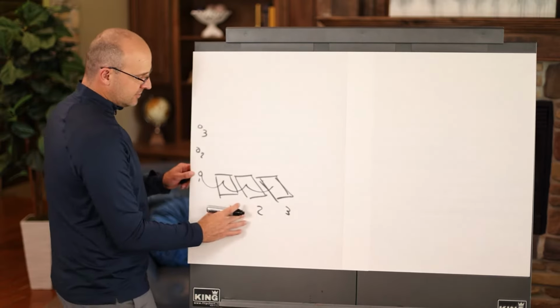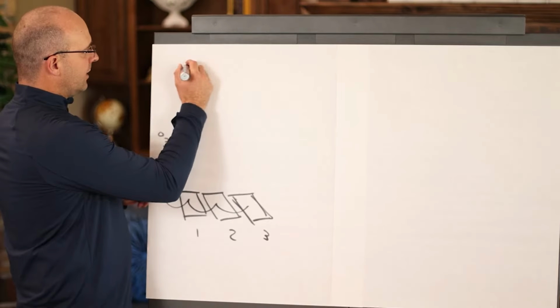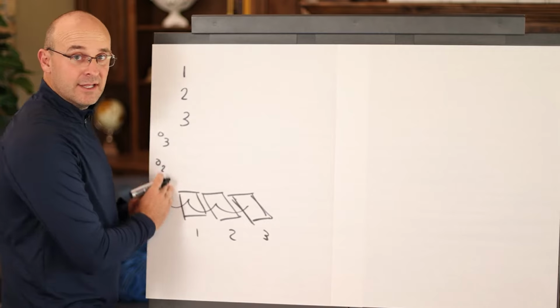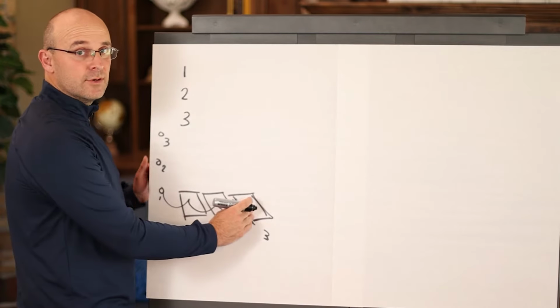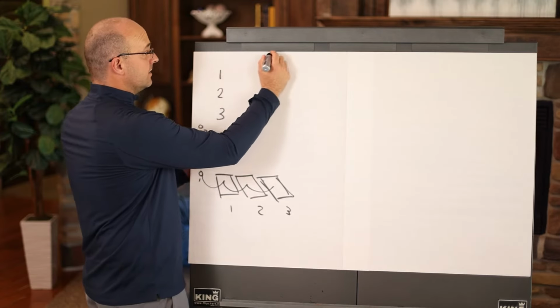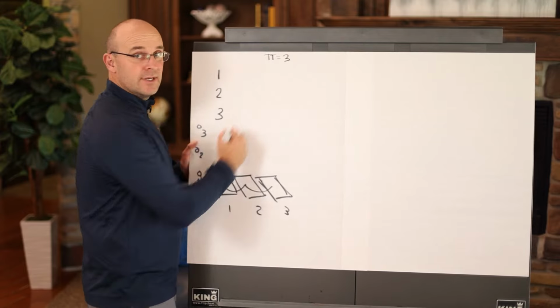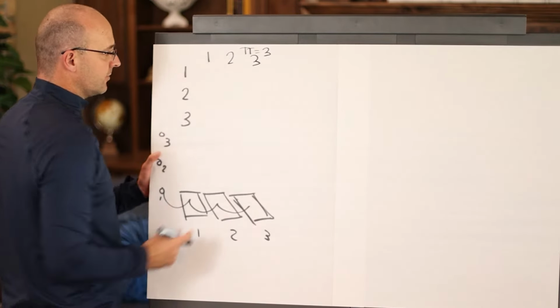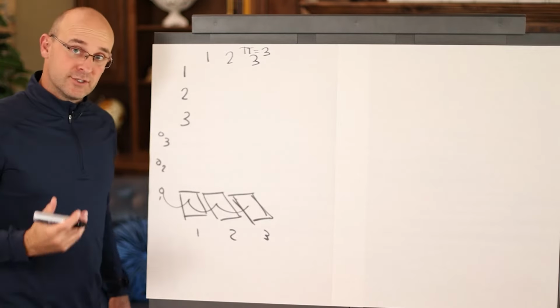And so if you take these zones over here and you write them up here to the left, and then you say, hey, these trades need to move through these zones on a takt time, and let's say the takt time is a 3-day takt time, and so you have takt time 1, takt time 2, takt time 3. I'll show you how it starts to format.